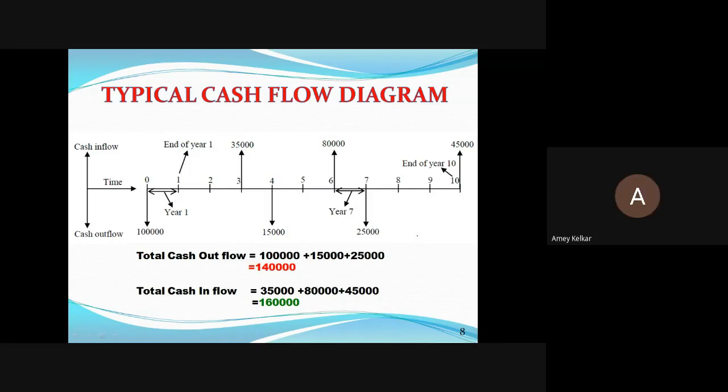Surely. Okay, so for simple activities, you can see how the cash flow diagram looks. Based on that cash flow diagram, when the owner asks you at what time, how much amount I should pay, many times we say, sir, we'll see, we'll tell. But if you are a contractor with a construction management background, you will have a cash flow ready for your project, so that you will be able to tell the owner, yes sir, after 2 months I'll be requiring approximately this much amount, and after the next 1 month, I'll be requiring approximately this much amount.